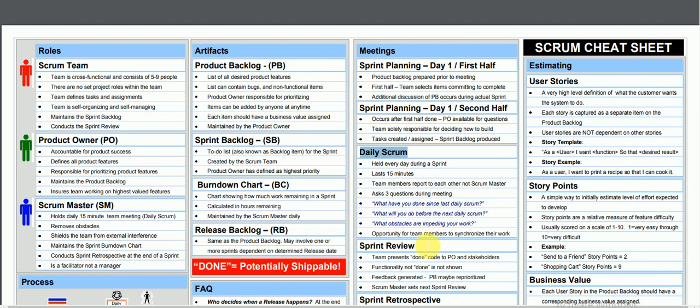Good. Next, sprint review. Once development is completed, they give the story to the testing team. The testers test the story, and once everything is working fine, or if some bugs are there, we send it back to the development team. They fix it, and once they have fixed it, we retest it. If everything is working fine, then we showcase that particular story's functionality to the product owner and stakeholders. If they are okay with that story, then we can consider that story accepted by the client.